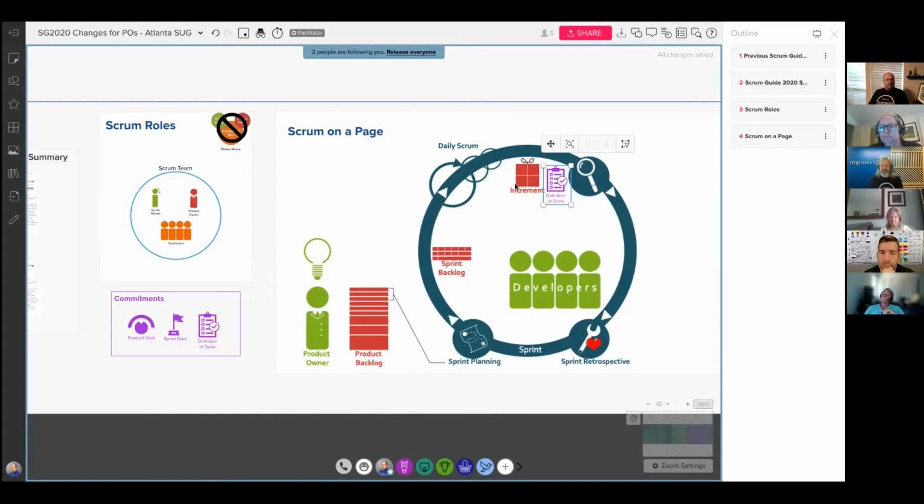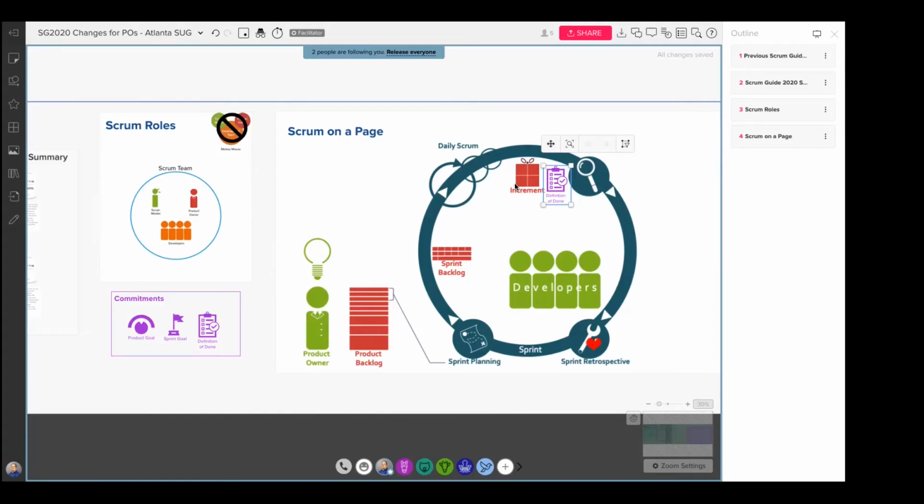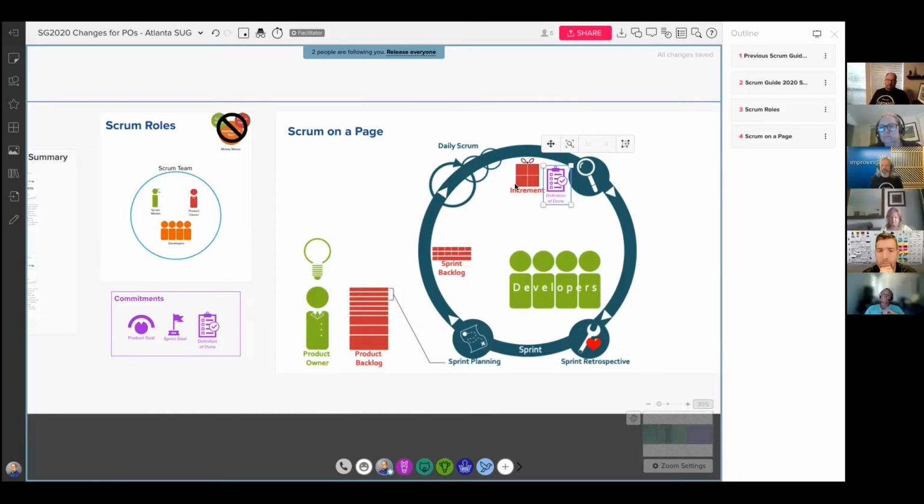And it is a commitment we expect to have here. And this is sometimes controversial too, because the word commitment was removed from Scrum in another place, which was how much of the product backlog do you commit to, used to be the verbiage in the Scrum Guide, that the development team at the time would commit to that. So then it became about, hey, you committed to 10 items, you only got 9 done, you failed, you broke your commitment, how dare you, right? So they changed that when they introduced the sprint goal.